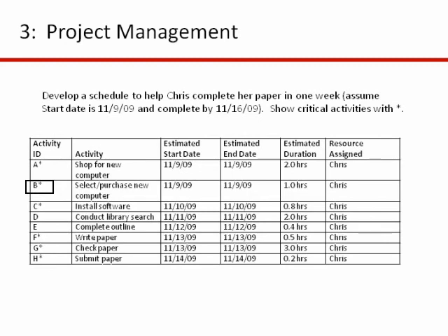Okay, and I have shown the critical activities with an asterisk there. And the reason those are asterisked is again, if those slip, if those take longer, or if something happens that prevents you from getting them done in the estimated time that you planned, it's going to delay the overall project. Okay, so that is why they're asterisked. It's just to call attention to making sure that those are managed and to have contingency plans available in case they run over or they don't get done in time. So questions on the schedule?